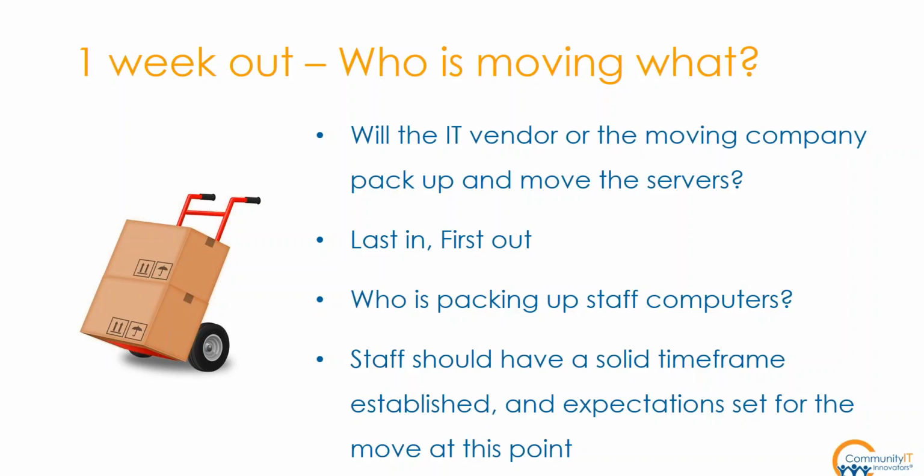A lot of moving companies have a last in, first out policy for servers, where they'll pack up the entire office and then put the servers in last. And then you and the IT people can just ride with them to the new office, and they'll take the servers right out first, and you can get those back up so that the IT people can get the internet back up and the servers back online as soon as possible.